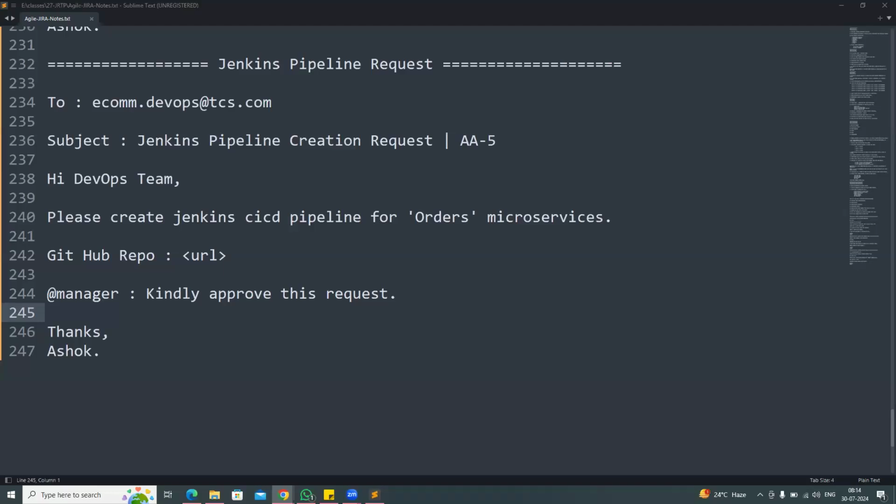And how can we generate a sub task inside Jira? Yes, sir. Inside the Jira, whenever you create one story, there will be an option called subtask also. In one story, we can create some subtasks. Suppose my story is taking 10 days of time. Instead of creating 10 stories, we'll create one main story. In that, we will create some sub stories. Sub story creation option also will be there. Sub stories are nothing but some small stories belonging to one main story.